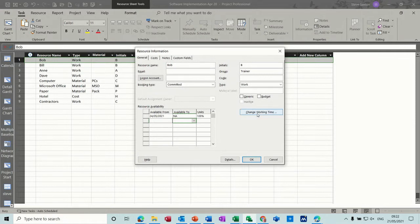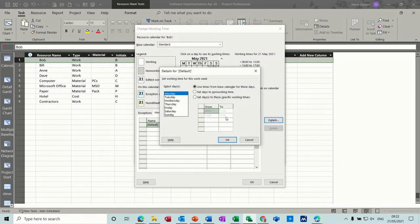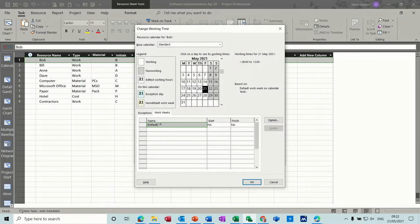Under Working Time you can change the working time settings. You've got work weeks and details. Let's say Bob only works until 12 o'clock on a Friday — you can change that default setting and delete that block. Again, that will have an impact: if you allocate him on a Friday for an eight-hour job it will move over onto Monday.